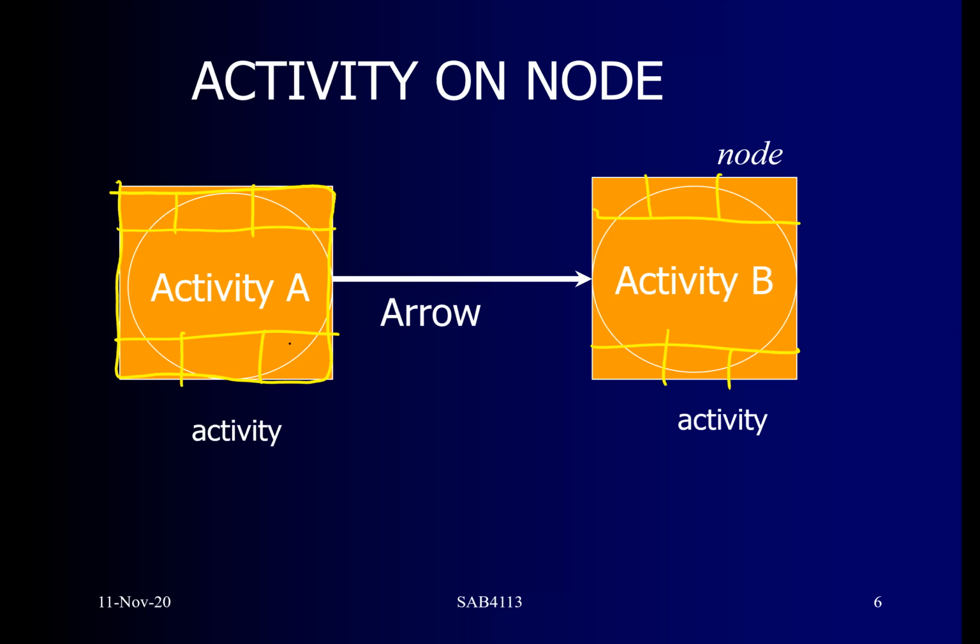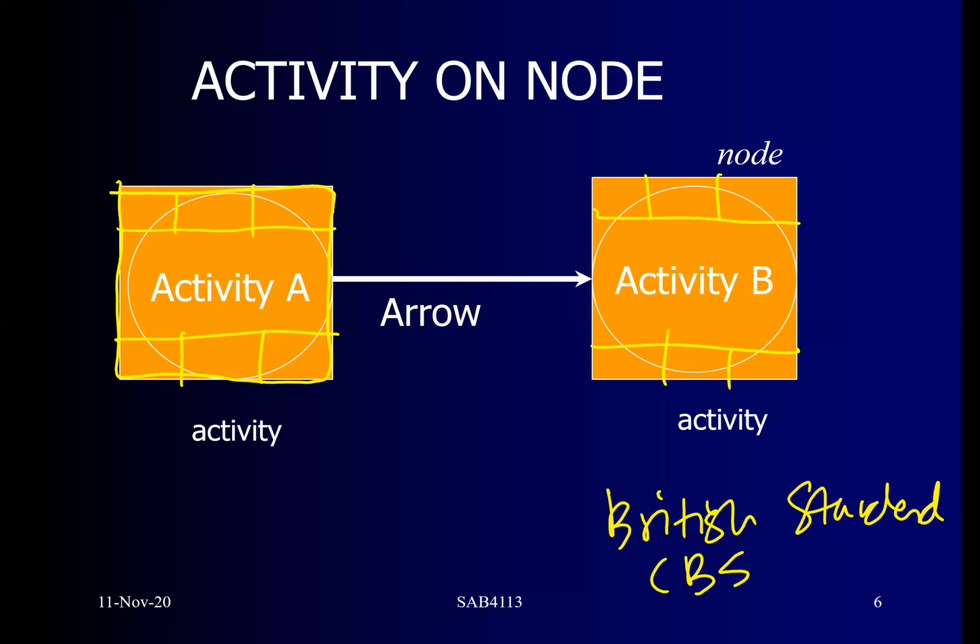And you can basically go to British Standard. British Standard is the one that we used previously. Now everybody in UTM is using Eurocode, but not outside there. Outside there, still using British Standard. If you Google British Standard, there is even a guideline or standard to draw the PDM diagram. How to draw the box? What could be the legend inside the box? So the legend inside the box indicates the early start, early finish, late start, late finish.